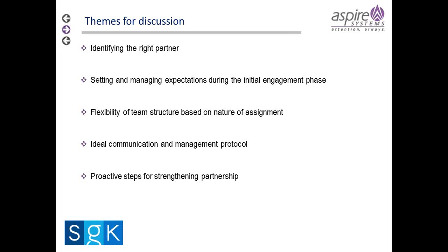And then another thing you mentioned, waterfall versus agile. So waterfall, again, might more typically fall into an 80-20, 70-30 type of ratio. But with agile, I personally believe we should have a heavy onshore presence because agile is always changing. Projects can shift, you get into scrums, you're writing user stories. So I believe you need to be very near your business analysts, particularly in an agile workflow.